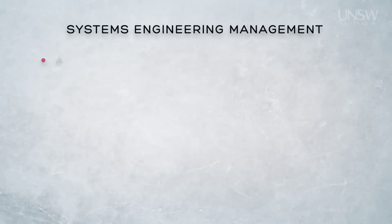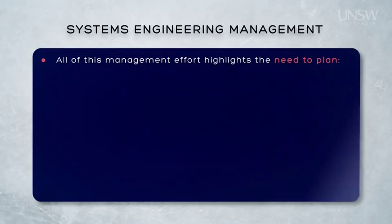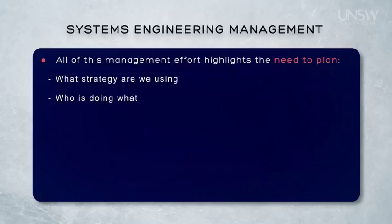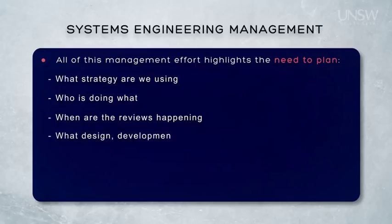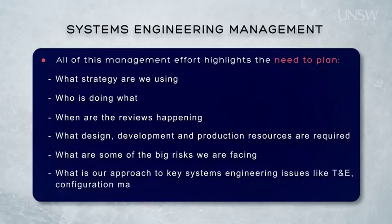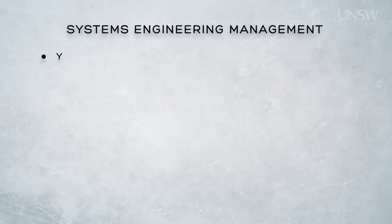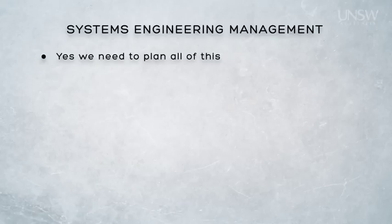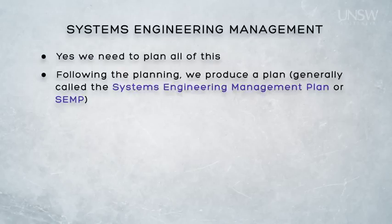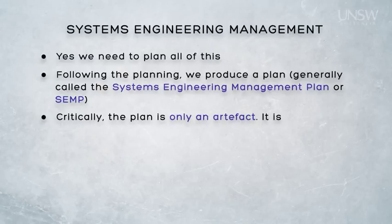All of the preceding discussions should highlight the critical importance of planning the overall systems engineering effort. We really do need to plan and answer questions like: what strategy are we using? Who's doing what? When are the reviews happening? What design, development and production resources are required? What are some of the big risks that we're facing? And what is our approach to key systems engineering issues like evaluation, configuration management and requirements engineering? In developing answers to all of these key questions, we will be going through a planning process. When we've agreed on the answers and written those answers down, we will have a plan. In systems engineering, this plan is generally called the Systems Engineering Management Plan, or simply the SEMP. The critical thing to remember is that the plan is only an artifact — it's the planning effort that is the most vital component.